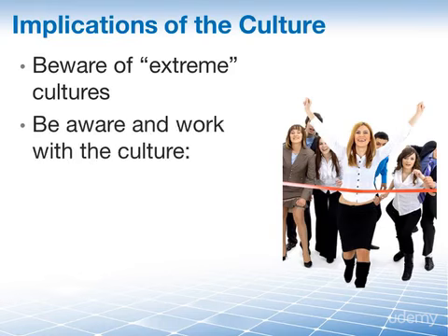Through every process, you have to be aware and work with what you have in terms of culture. For example, getting support of team members for onboarding a new staff member should be easy in an open system culture. On the flip side, plan on more resources and time in your estimate when you have an uphill battle against a negative or difficult culture. For example, count on more time spent on stakeholder management and communication in a closed system culture.